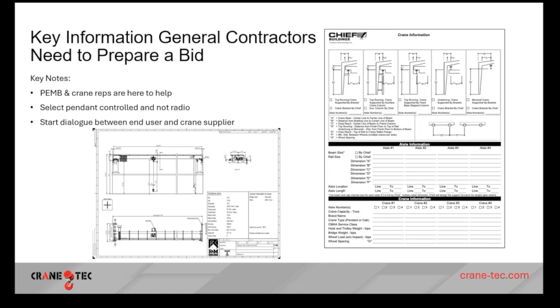All the information is on the crane drawing, but what I suggest you do is send your crane information data sheet to your crane supplier. I fill out these sheets for my builders all the time, or we'll fill it out together. But I think it's really important to get everybody involved at that point in time. The sooner you get your crane supplier involved, the better off you are. These crane drawings, if you call us up and tell us that you need a crane drawing on a 10-ton, 60-foot span crane, both Mark and Justin crank those out in about 5 minutes. So it's really no big deal.